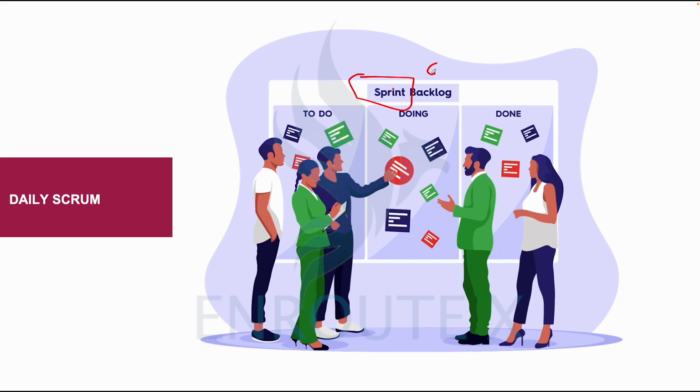must have a goal. I mentioned that also in the last class, that while the team is having a sprint planning session, they should come up with a sprint goal. It's expected to be a goal, but on the field you could have different goals when there are different reasons for it. So there is always a sprint goal, and this is how the sprint goal comes to play. So your discussion on the sprint at the daily stand-up is expected to focus squarely on the sprint goal.